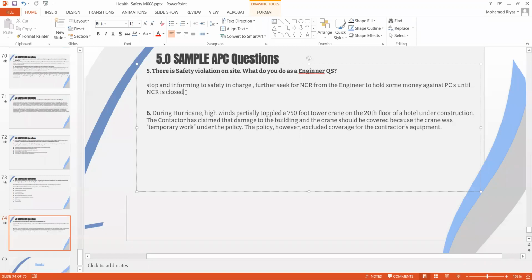What will happen? The legal case will come into the picture, and the main contractor needs to step in on behalf of the client and take over because contractually he signed the indemnity provisions. So for this unnecessary headache in the workmen compensation, you can simply ask for an indemnity provision for the respective project and indemnify the client. You can avoid such a litigation process that he needs to go through.